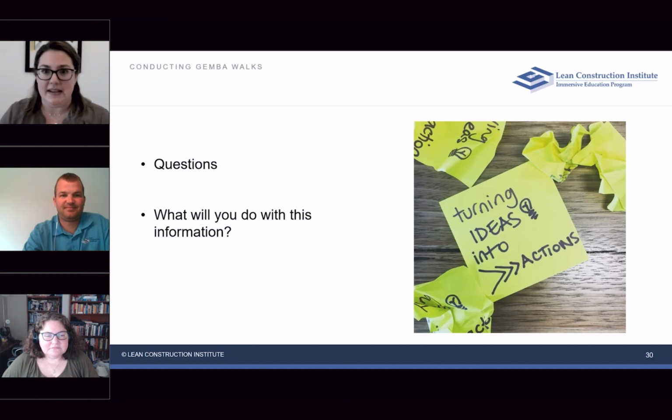And some of that might be really easy. Some of that might be just like we talked about, a just-in-time delivery. Some of that might be better communication through an understanding of a work sequence through a pull plan, and then using weekly work plans and look-ahead plans. And then also doing the same thing from the top down, understanding at the top level what are some of those risks and constraints that they are really worried about, and utilizing those to help them. When you start to show them the value, and it's not just a lot of theory, then they start to see that, and they start to grab on, and they want more, and they want to do more.